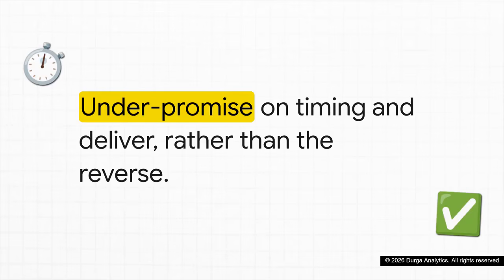This sets the right expectations right out of the gate. So, here is the absolutely crucial takeaway. If leadership at your firm wants everything done in 6 months, do not pad the plan. Do not say yes just to please them. Commit to a concrete Phase 1 win in that window, like getting one critical domain fully governed, and phase out the rest. Padding a plan to look fast up front will completely destroy trust when it inevitably slips. Always underpromise on timing and deliver.